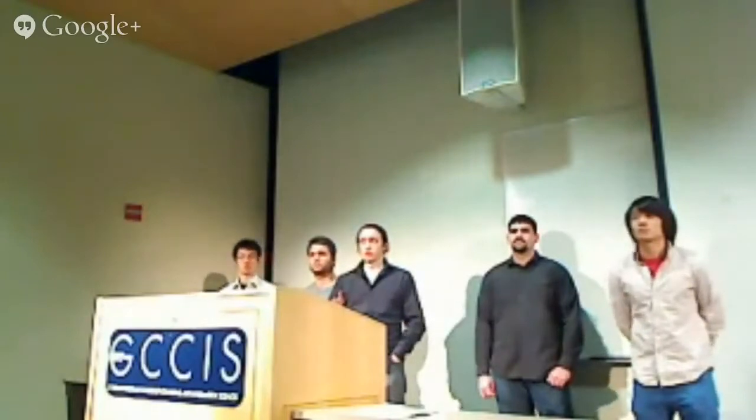Currently, for sprint planning, we're allocating about 4 to 5 points per person per sprint. We figure about a point is worth somewhere around 2 hours of work. This gives us a little bit of a buffer because we've seen that we're kind of notorious for underestimating how hard tasks are and how long they're going to take. So it gives us a little more wiggle room than, say, 5 or 6 points would.